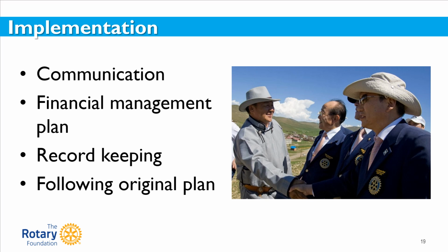Remember, for global grants, you must follow the Rotary approved grant plan. Any changes to the scope or budget of your project require Rotary's approval.